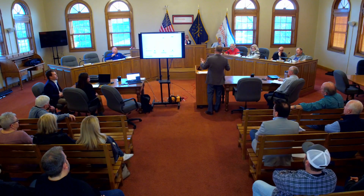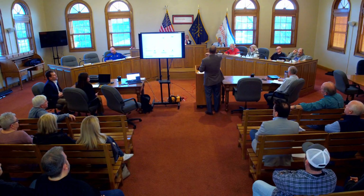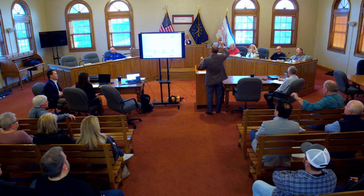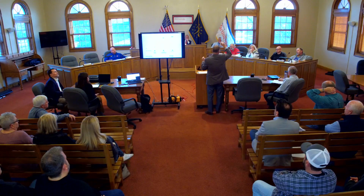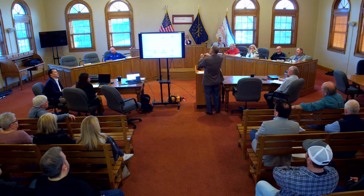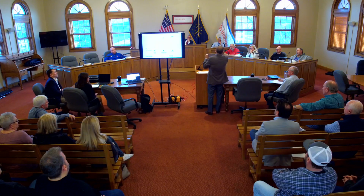systems that you will wind up encountering, okay? That's what's represented by the single dollar sign. You'd like to think this curve was linear, right? You'd like to think it started at the lower left and just went to a straight line to the upper right. The reality of it is the moment you start to get into changing anything having to do with HVAC, anything having to do with electrical, anything having to do with plumbing, all those systems are going to very, very quickly trip you into other requirements. And so that's why you're seeing this curve that's on the screen saying, hey, in this building, we can do a fair amount of finish type work, carpet, ceilings, paint, at a relatively low expense, but very, very quickly it will start to get very expensive and you'll wind up committing to having to do a whole lot more work.